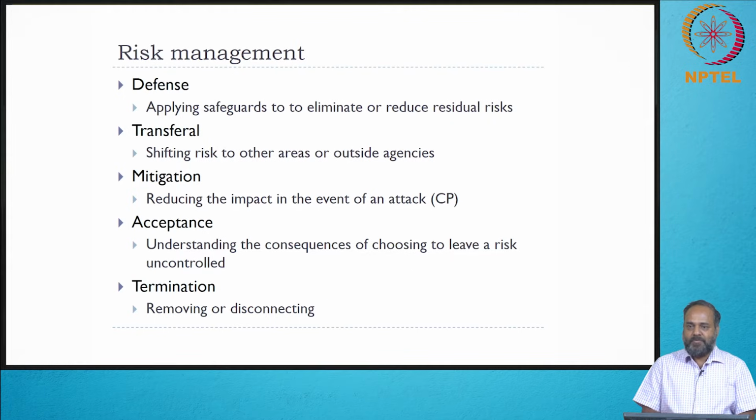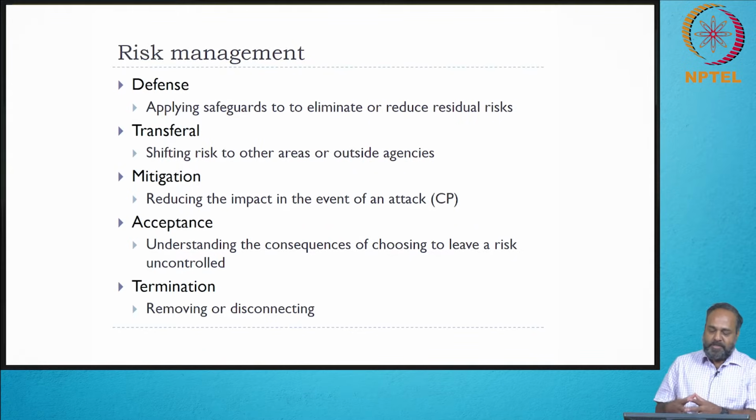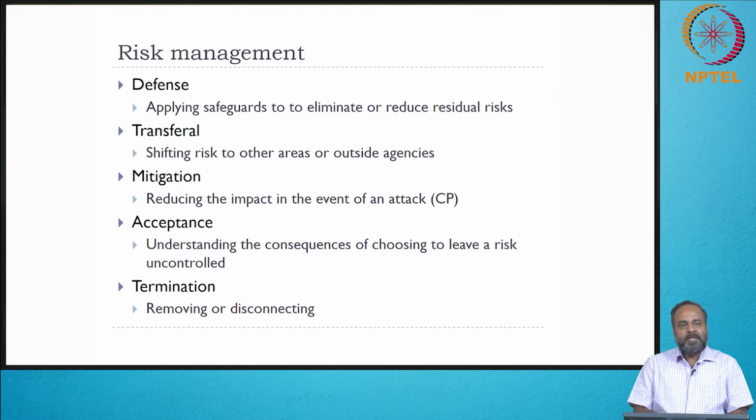Assessment means it's more at a quantitative level. You try to measure, and bring some sort of precision to each of these categories. You have identified your assets, but how do you value them? If they are affected, what is the financial impact, and therefore there has to be some valuation of these assets. Then you also look at threat intelligence: what is the probability that a particular threat would materialize, and if that occurs, what is the chance that it will be successful given your existing defense systems.